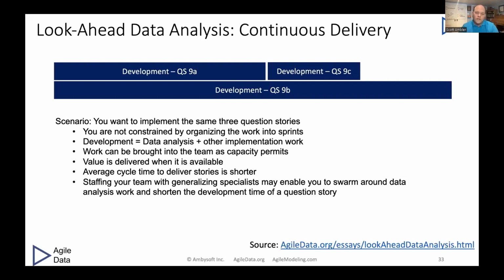So we do all the work required to get the job done, and we get rid of this planning overhead stuff because we're pulling in things on a just-in-time basis. So it's a lot easier to staff, it's a lot easier to lead these sorts of teams. And this is simply because we've moved to more of a lean Kanban-based approach. And for those of you familiar with Scrum and Kanban, this has been an ongoing religious debate for at least 20 years.